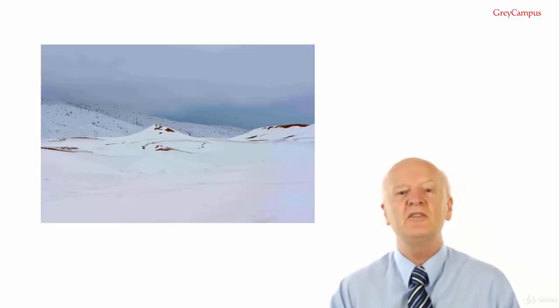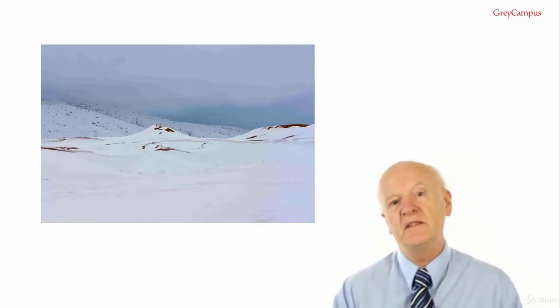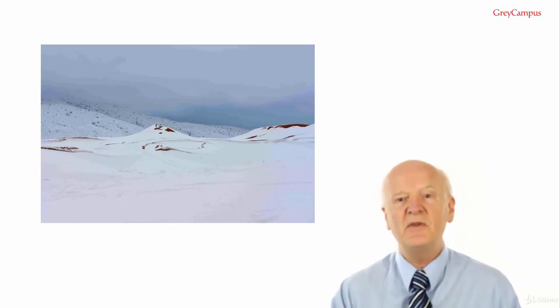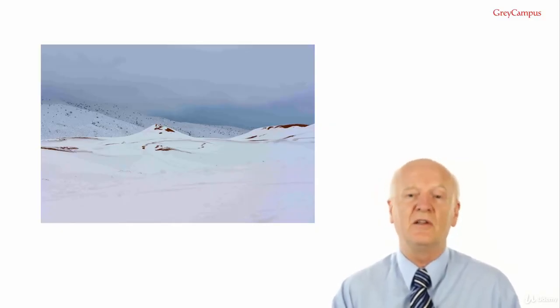There is a risk that the materials might get wet, but even though the impact would be high, in fact very high, the likelihood of the desert being wet is minute. On December 19, 2016, which is pretty recently, it snowed in the Sahara Desert for the first time in 37 years. It was just a thin coating of snow, but enough to destroy a lot of our materials that had to be kept dry.